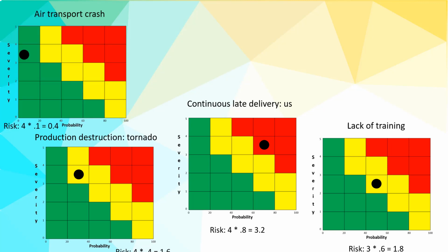Have one more though. What if our product ends up on an air transport that crashes? Now, we're not talking about total destruction, but we're talking about a crash that impacts our ability to deliver product. Well, we look at the risk as a 4. We think some of it will be destroyed, not all of it. We do have others to ship. It's not our plane, so we're not in control of that, but we think it really only has a 0.1% chance of happening. Now notice that I used 0.1 here. What I really should have used is 0.2, right?